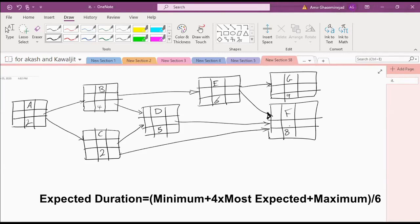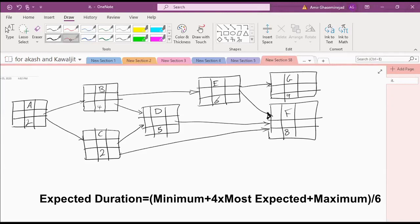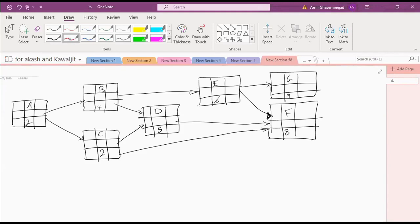Now that we have the expected durations based on beta distribution, we can go the forward direction. A can start at zero. Earliest finish is two, two, two.